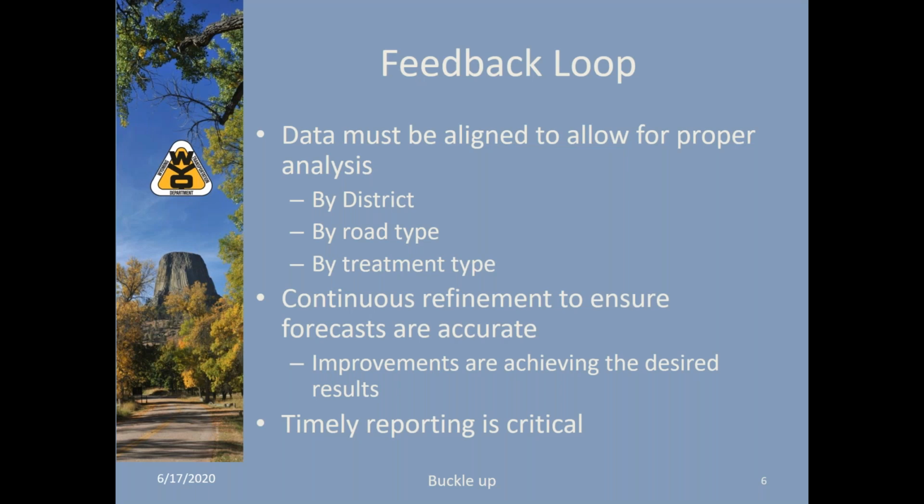Timely reporting is critical. In Wyoming, there's only a few weeks from when the draft STIP is set to when it gets approved to move forward for public review. If the STIP does not meet the miles or the square feet, it must be brought up immediately. That's a lesson we learned a long time ago, and it has paid dividends to have the integration in there.